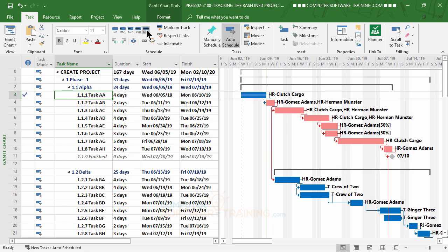So what happens is I get a completion bar, 100% going through the whole thing. The task actually becomes a non-critical task. That's why you saw it turn blue. And the reason why this went from a critical to a non-critical task is because now it's complete. It will have absolutely no bearing on the rest of the project, so therefore it's pretty much deemed to be not critical.